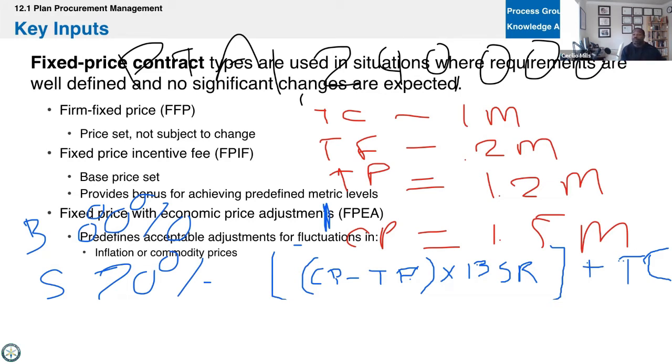So of that 240,000, you've ended up paying 48,000, and I paid the rest. And then from that point moving forward, from 1.24 all the way to 1.5, you as the seller will pay for all of the costs by yourself.